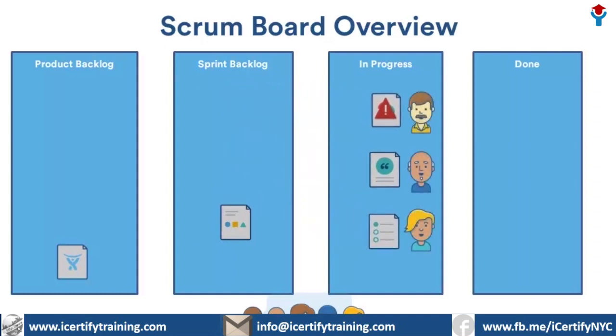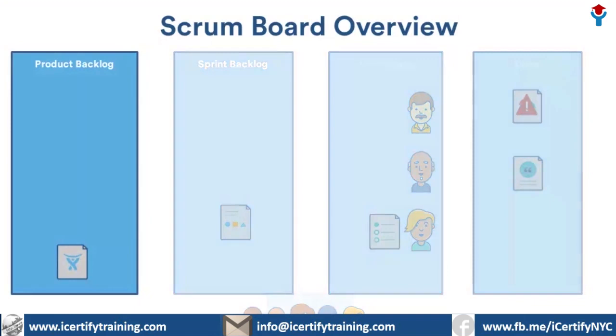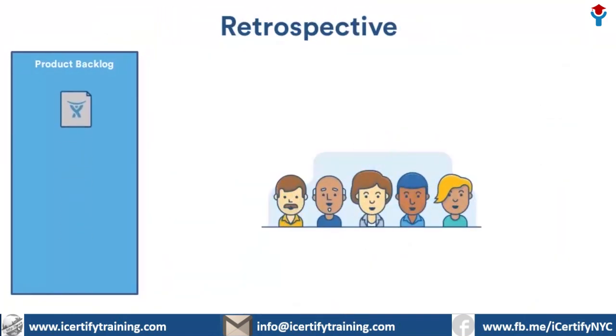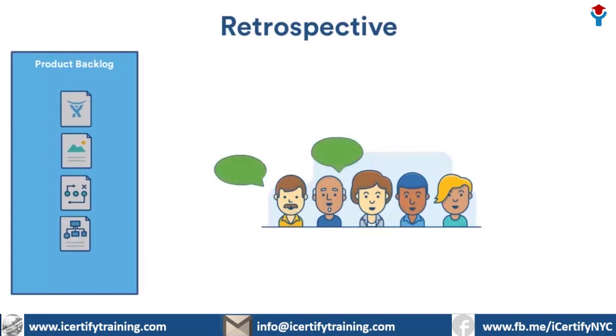Once the sprint's finished, the team typically holds a retrospective meeting to assess the work completed. At this meeting, the team might adjust the product backlog to reflect findings such as incorrect estimations or other inefficiencies before beginning another product iteration in the next sprint. Learn more about the nuts and bolts of planning a sprint by clicking the resources link.